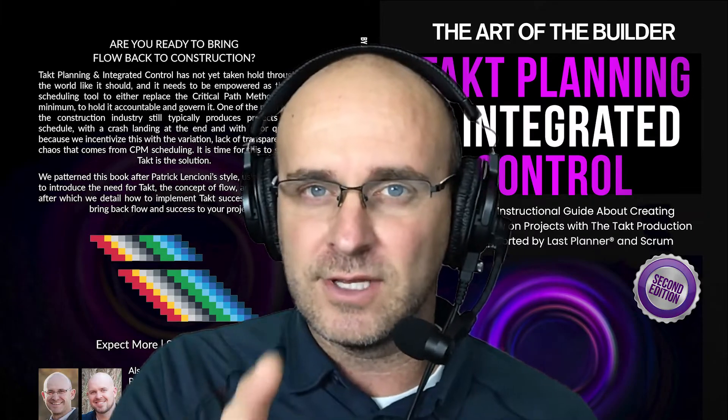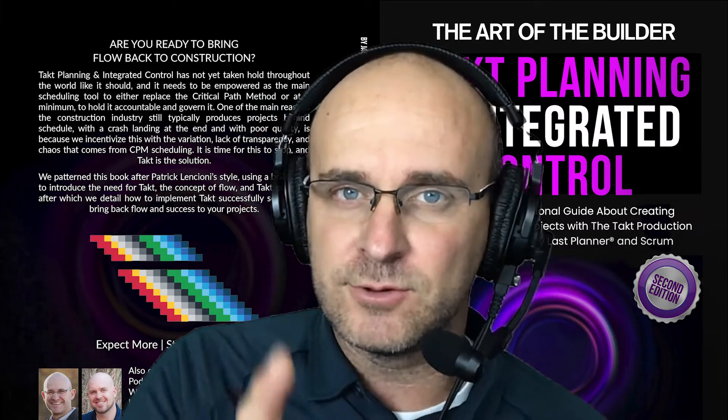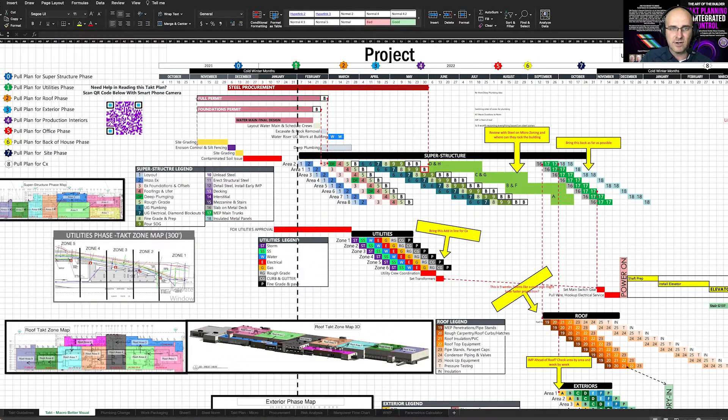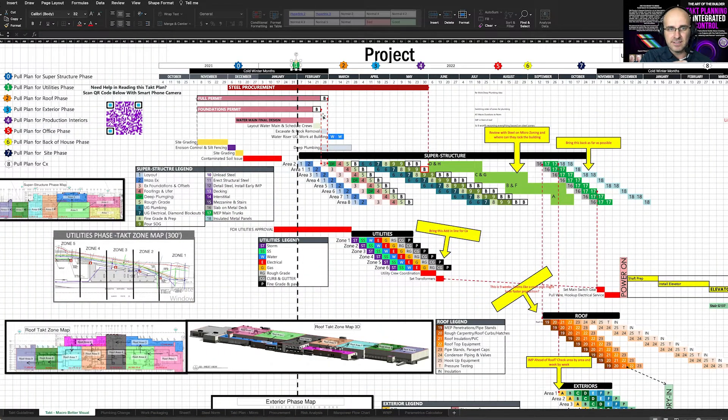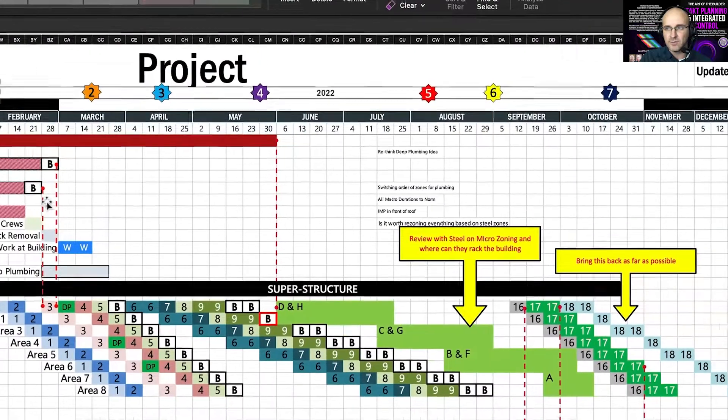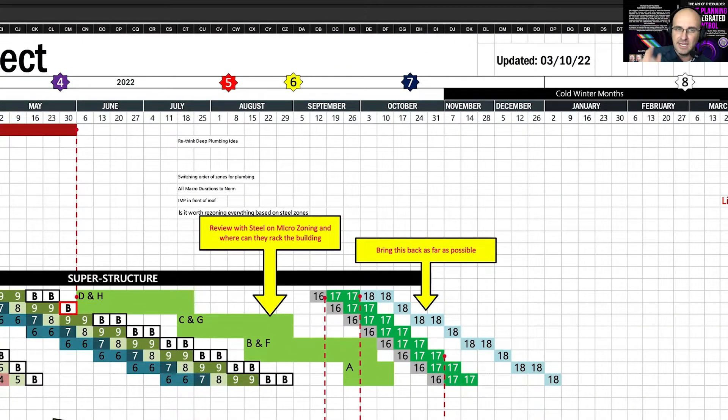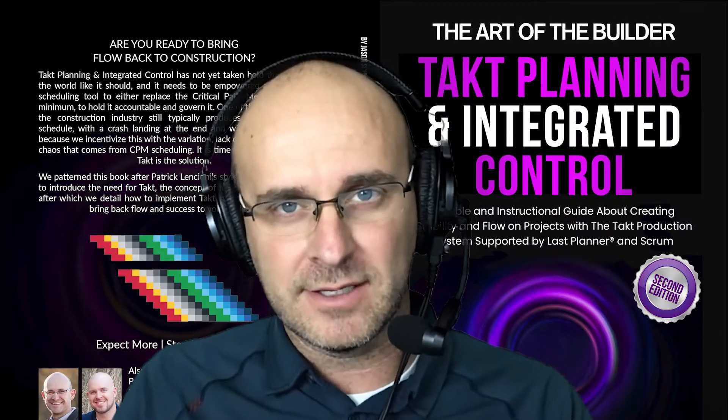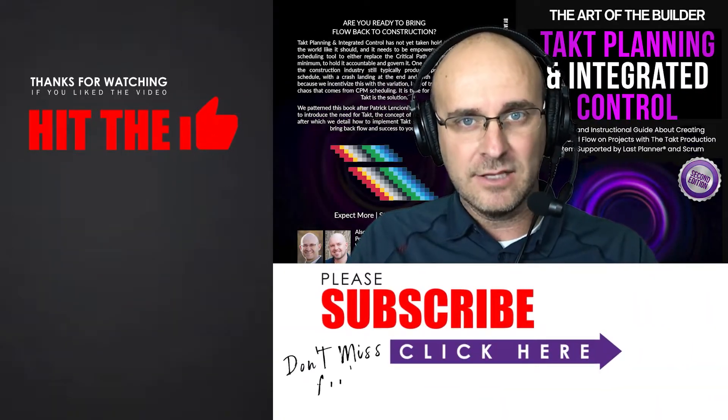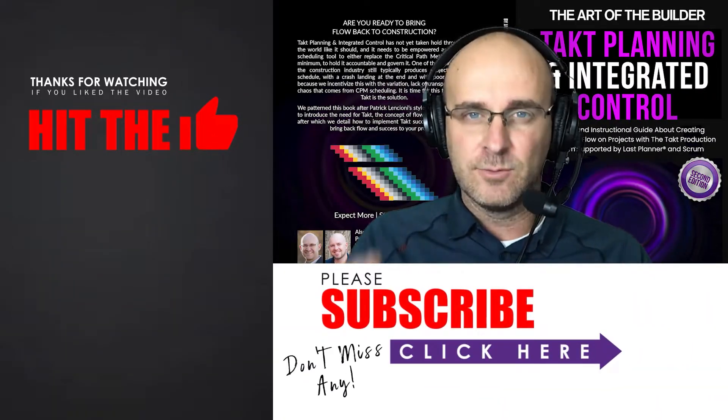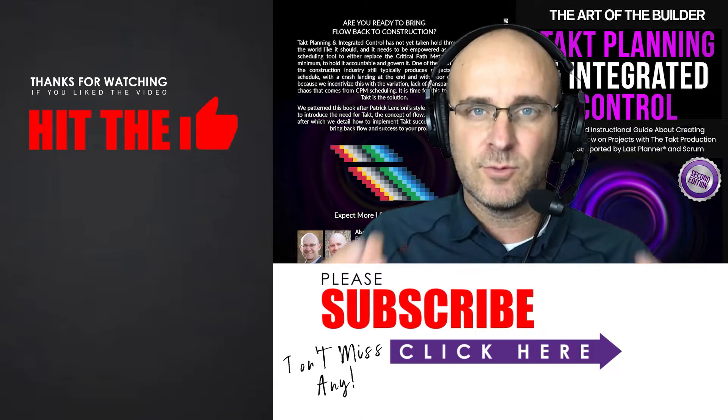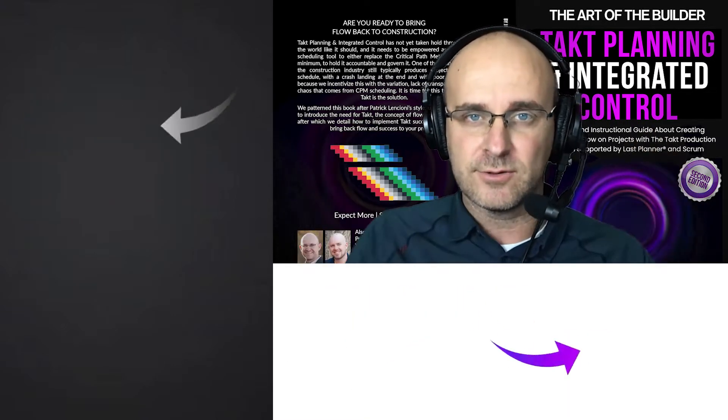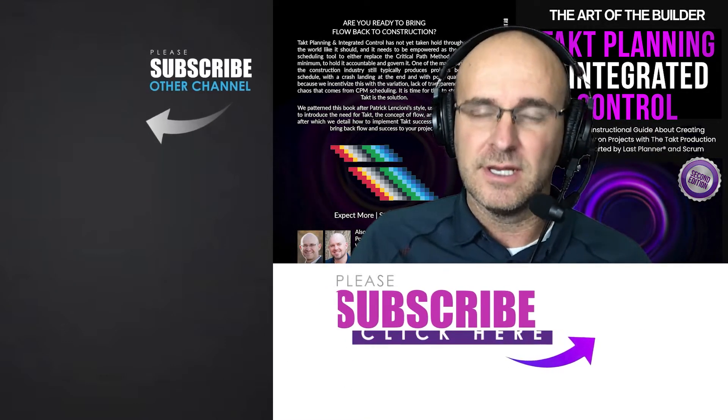In order for us to do that, we must be triggered by one of these indicators on the schedule like this zero one through eight that tells us pull plan this phase. If we have that in enough time ahead of time, then we can get the right sequences, confirm that tacked phase, gain those buffers and really set out to win for our short interval scheduling processes.